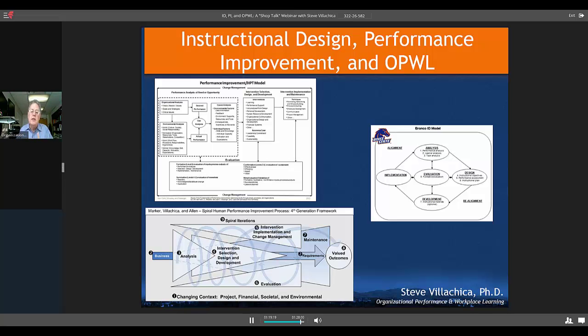By the time it hits design, that mistake may be $800 to $1,000. By the time it hits development, that may be 10 to 100,000. If it hits implementation, we may be talking about millions or more. And so systemic helps us make sure that we're not filtering bad mistakes and rippling them through our systematic approach.